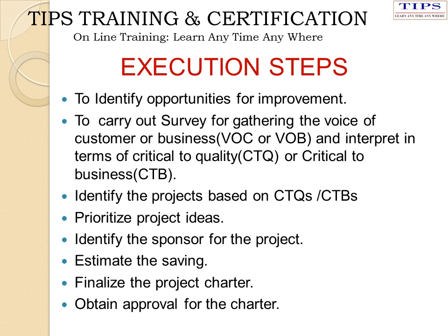To identify opportunities for improvement, to carry out a survey for gathering the voice of customer or business, and to interpret these in terms of critical to quality or critical to business. Identify the projects based on CTQs, prioritize these project ideas using the project matrix, identify the sponsor for the project, estimate the savings from the project, and finalize the project charter.